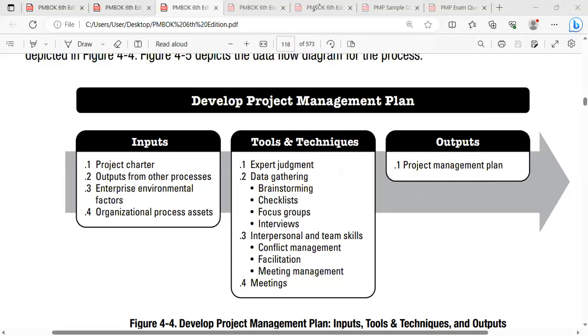There is no plan called an integration management plan, but there is a plan called the project management plan, because in integration the project manager and the project management team get contributions from various departments, integrate all the management plans, and produce a single master document. We call that the project management plan. It's a master document, a mother document, a guideline document, and a continually evolving document. It shows the complete information about the project to the execution team. Those who receive the project management plan have to follow it, or follow the updated project management plan.